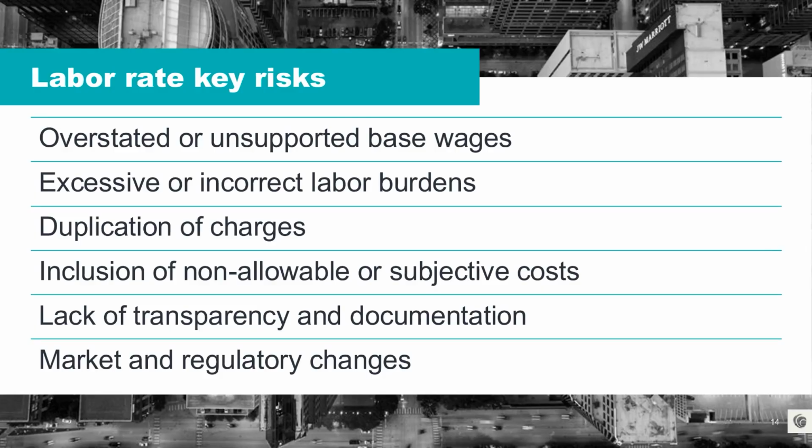So let's start out the discussion on performing a rate decomposition by going through some of the key risks related to labor pricing. The first of those is overstated or unsupported base wages. What you may see are proposed hourly wages that are higher than actual payroll costs or include future wage escalation without proper documentation. And this leads you to pay more than necessary, especially on multi-year projects if increases are not justified.